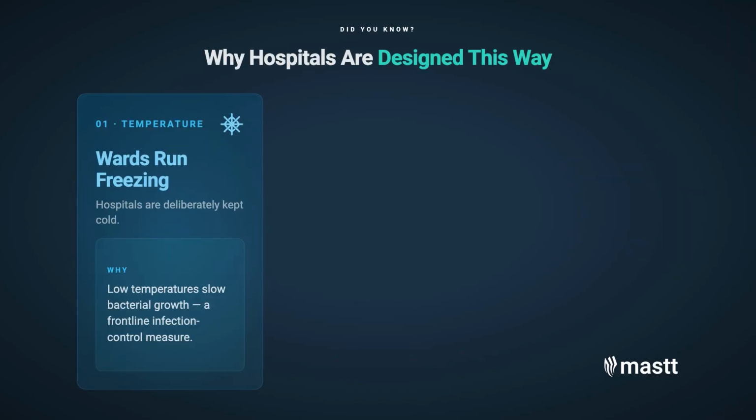What's a good example? We've been out on site when a contractor has demolished or cut through a wall and hit a water pipe, and that's obviously released a whole heap of water, which has flowed into clinical spaces below, which can create a whole range of issues. So that's probably the first one that comes to the front of mind. But there's always issues that we're picking up with looking at ceiling space voids. Having ductwork sitting too low, for example, or having dead legs in plumbing pipework, which bring leaks at risk.